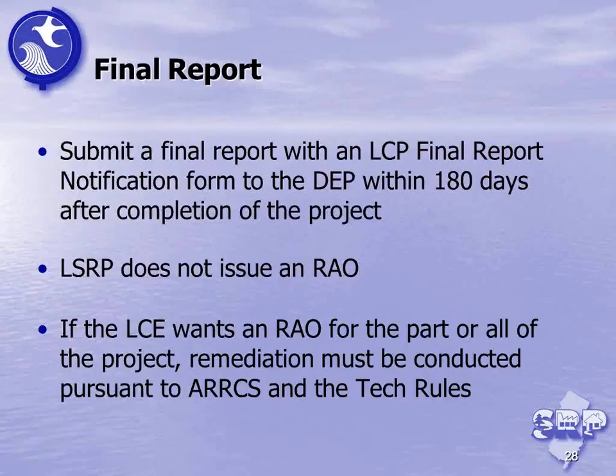So you get to the end of your project. It could be a few months, it could be a few years, it could be many years. You're required to submit a final report, an LCP final report, and accompany it with an LCP final report notification form to the DEP within 180 days of the completion of the project.